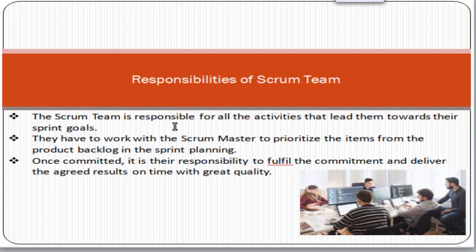The scrum team is responsible for all the activities that lead towards their sprint goal. A sprint is a three to four week time period. The sprint goal means, for example, if there are 40 tasks in total and you took 10 tasks for a sprint, the sprint goal is to complete those 10 tasks for that sprint.